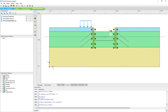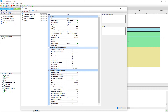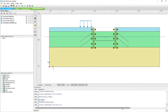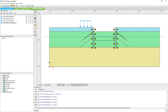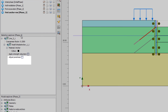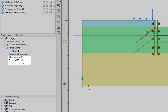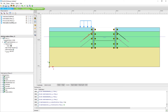The next phase is the first anchor row, also a plastic phase without changes to default settings — a drained excavation. We activate all the anchor elements. While installing ground anchors, we also pre-stress them: selecting an anchor in the selection explorer reveals the pre-stress option. We set the pre-stress value to 500 kN per anchor. The same is applied on the other side, also at 500 kN pre-stress.